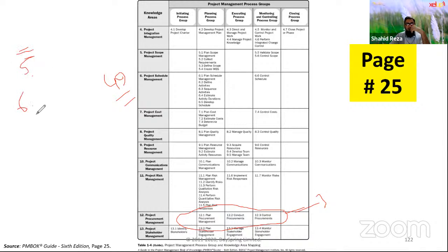Number 6 concept is there is no guideline that one process will happen only once in a project. So the same process can repeat, or iteration can happen for some processes. Using one process only once out of these 49 processes is not mandatory and not necessary.